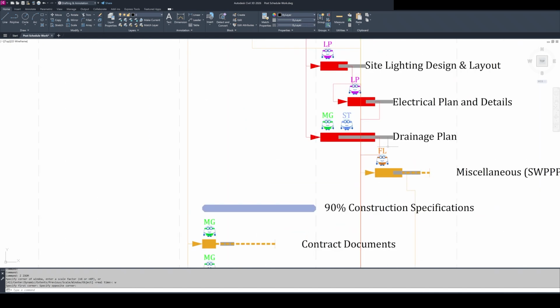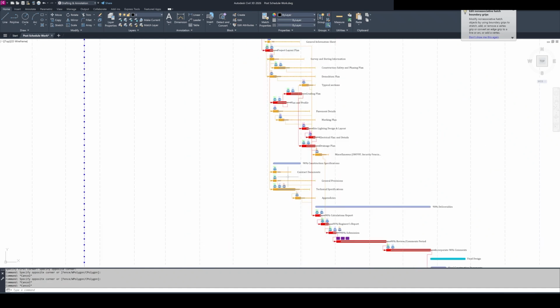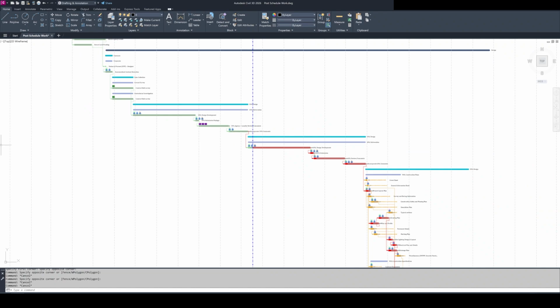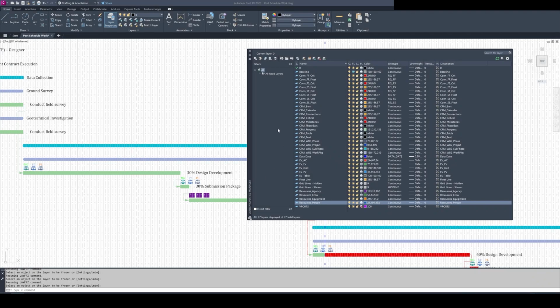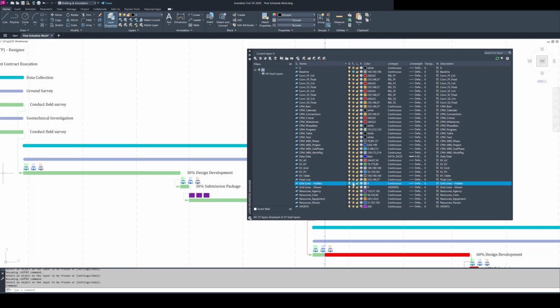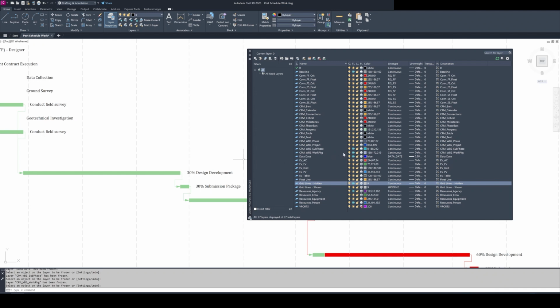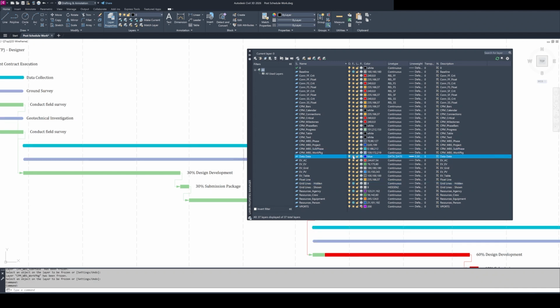All of these elements, activity bars, ghost bars, connection lines, milestones, text labels, are drawn on their own dedicated layers in AutoCAD. This gives you full control over what's visible. You can choose which elements to include when generating the chart in the CPMCAD window, and then further refine the display by freezing and thawing layers within AutoCAD itself. Need a clean printout showing just the critical path without ghost bars? Freeze those layers. Want to show the full comparison for a progress meeting? Thaw everything. It's standard AutoCAD layer management applied to your schedule graphics.